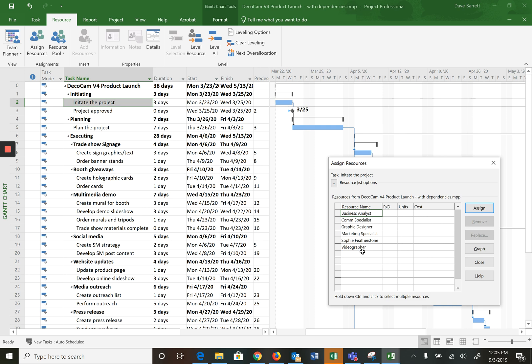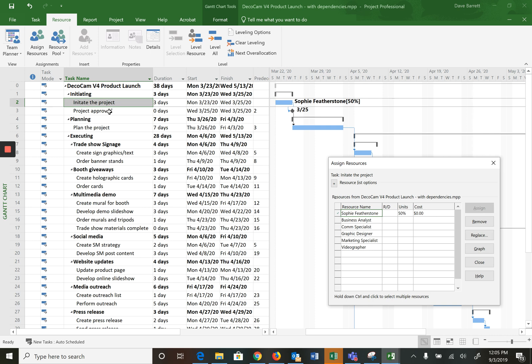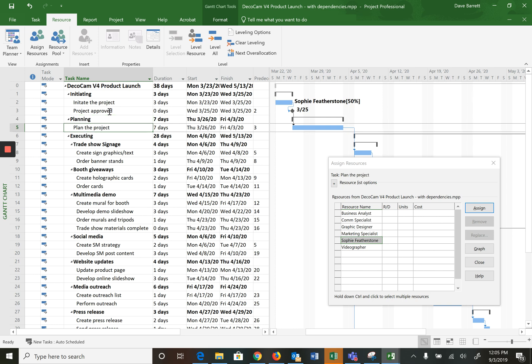And now it's asking, well who, what one or more resources are going to work on this activity? So in this case it's Sophie for 50%, and make the assignment. You can see she ends up here, so all good. Project approval is a milestone, don't assign resources to milestones, there's no work involved, it doesn't make sense.